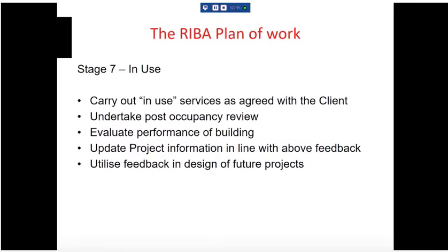In use is an interesting stage. So lately, architects and clients have thought to themselves, we really should be learning from the mistakes we've made in the past. So what sometimes happens now is people undertake a post-occupancy review that takes place over the first 2 years of the building's life. And either the problems that occur are rectified, so if this room's very stuffy, they turn up the ventilation system, or if there are problems that really can't be rectified, well, we can learn from them on the next project.